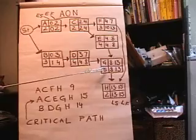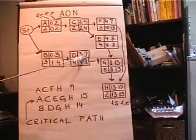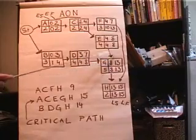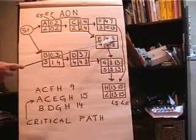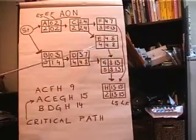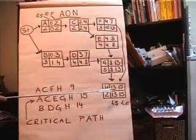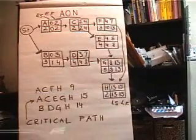It gets a bit tricky down here, for example, when we're deciding should we take the 8 or the 7 for the earliest start for activity G? Well, it turns out you take the longest, the 8 is the earliest start, because that's the earliest finish for E, and both have to be complete before we start activity G. And the same is true here, we take the 13 and not the 7 for activity H.